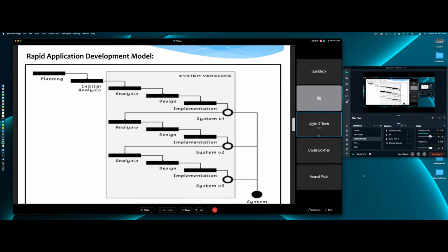So we can't do that. So let's see how many individual teams we can set up. And according to this model, we were able to put together 3 teams. And we will try to break our vehicle into modules and handle these modules between the teams. Since we have said that the complexity of each module is the same, how many modules will you give to each team? 2. How many modules do you have to build? 6. 6 divided by 3 teams is 2 modules each team. Agreed?